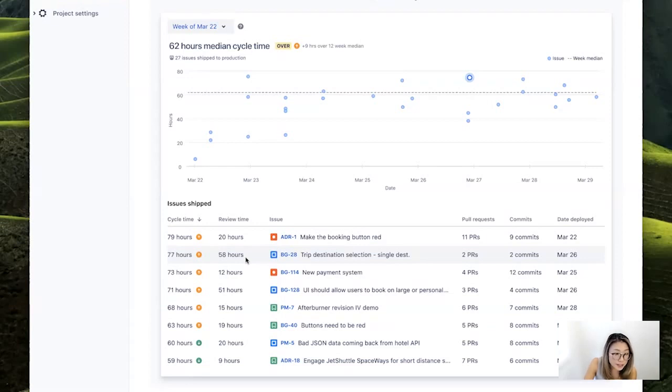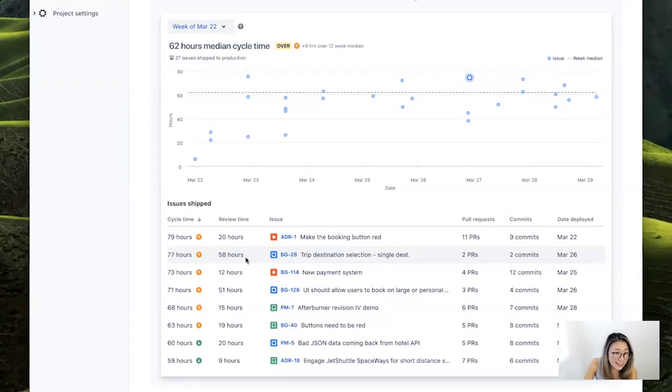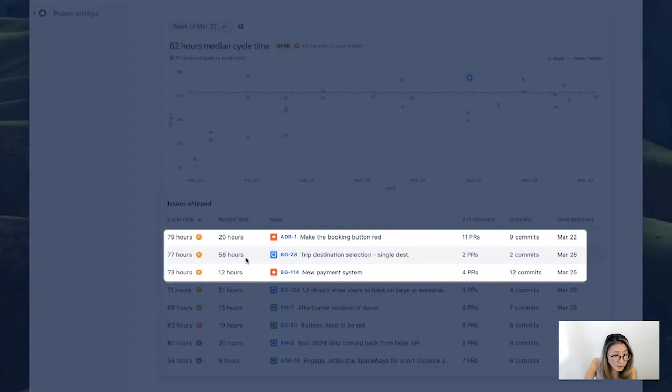And so this view focuses on the problematic week of March 22. And on the graph on top, you can quickly see which issues are the outliers and have the longest cycle times over the median line. And digging into issues with the longest cycle time in the table, you see here, top three, very long cycle time, and actually one of them has a really long PR time of 58 hours, which is two PRs. And so it's a good time to discuss with your engineers what's been happening here.